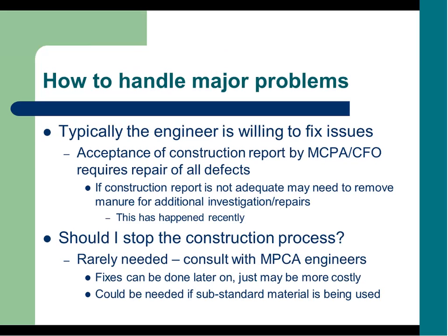If you have to handle a major problem, typically the engineer is willing to fix. I haven't had very many instances where if there was an issue, the engineer has done anything but said, we'll take care of it, we're moving forward. We do need any major changes to be approved by the state and or the county. If the construction report is not adequate, we may need to remove the concrete for additional inspection. It actually has happened where we've made them clean it out and take a look.